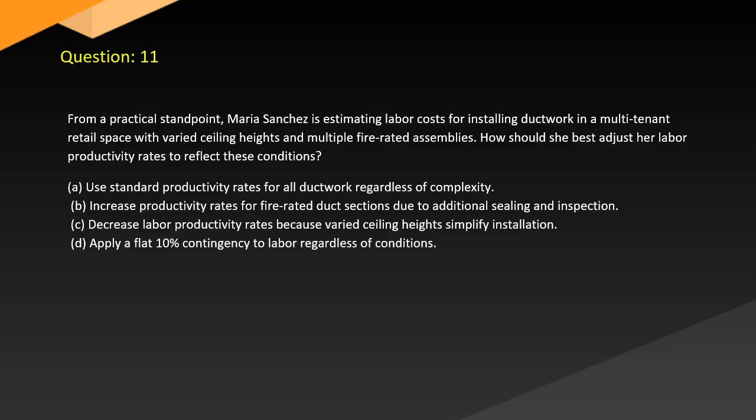Question 11. From a practical standpoint, Maria Sanchez is estimating labor costs for installing ductwork in a multi-tenant retail space with varied ceiling heights and multiple fire-rated assemblies. How should she best adjust her labor productivity rates to reflect these conditions? A. Use standard productivity rates for all ductwork regardless of complexity. B. Increase productivity rates for fire-rated duct sections due to additional sealing and inspection. C. Decrease labor productivity rates because varied ceiling heights simplify installation. D. Apply a flat 10% contingency to labor regardless of conditions.